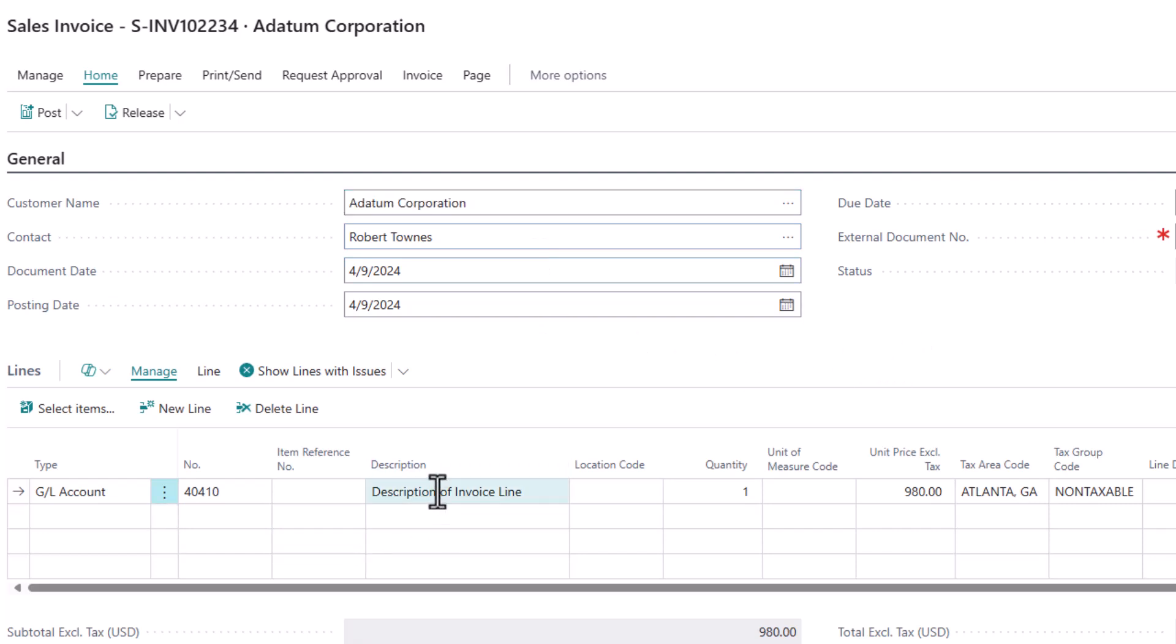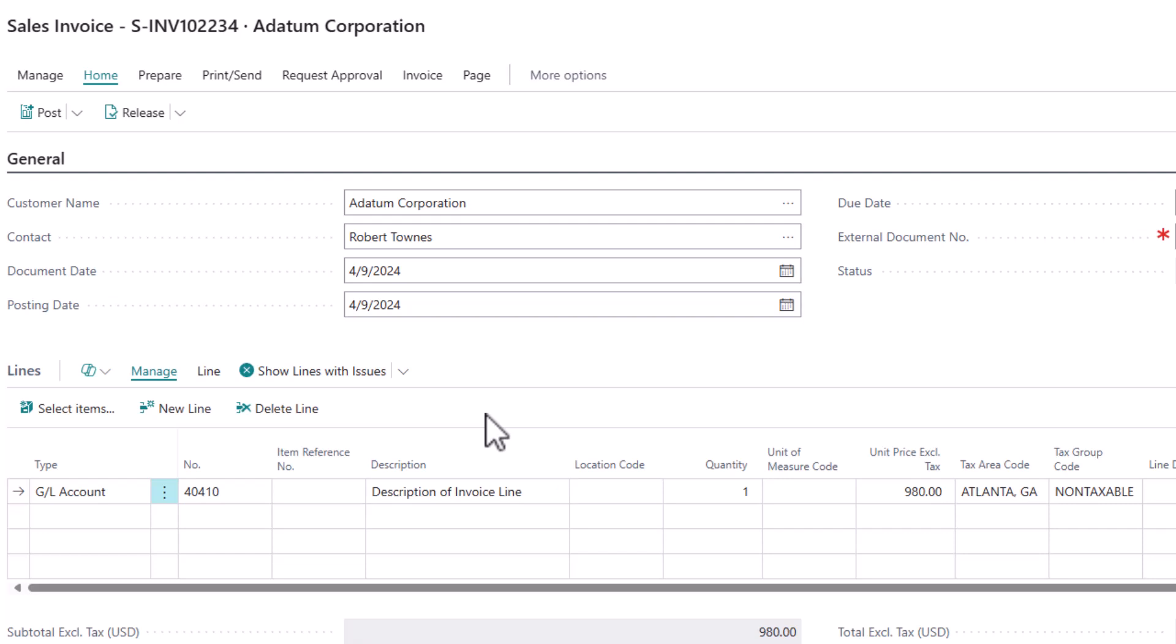And you can see description of invoice line is what came over. So it is not based on the task description. It is based on the description of the planning line. So that's just a key distinction I want you to make.